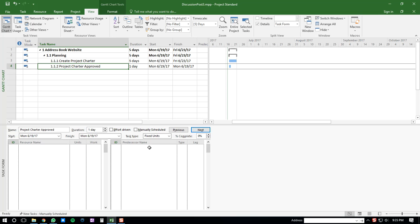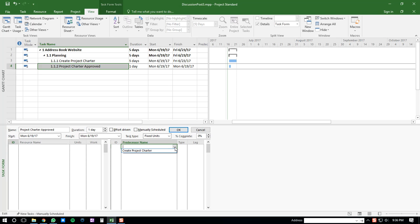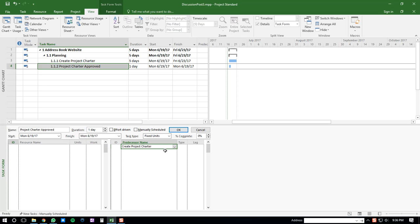you'll click right here on the predecessor name, and then you'll just select the task that you want to create a start-to-start dependency with. So that's going to be Create Project Charter within this example.